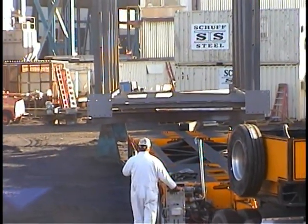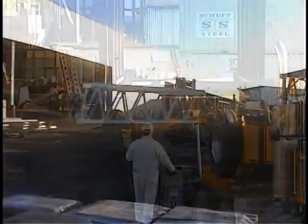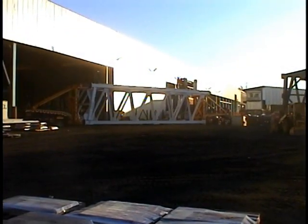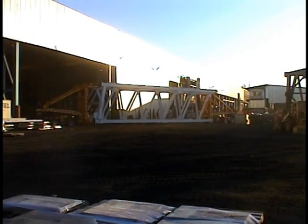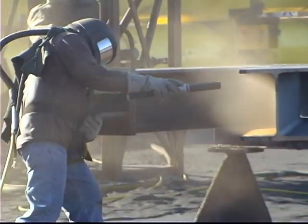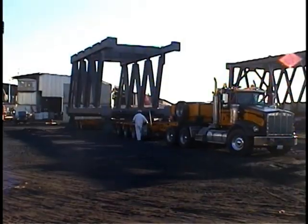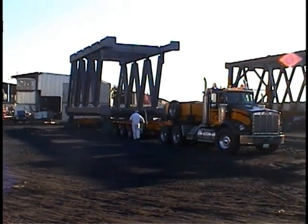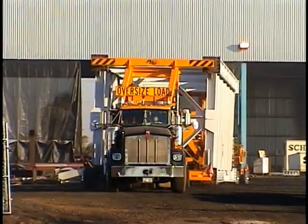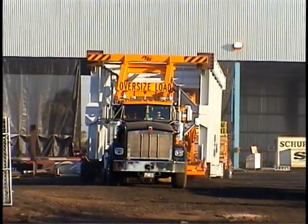Each section was set on 2 I-beams located on the required load points of the trailer. From there, it was moved from the fabrication shop to the laydown area where the supporting I-beams were lowered onto stands. Once the section was sandblasted, PHH would back under the section, raise the trailer for reload, and transport it to the paint shop where an overhead crane was utilized to offload. Upon paint completion, the section was then loaded into the Schnabel trailer and readied for transport.